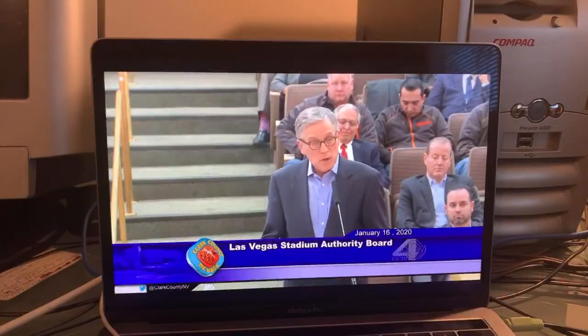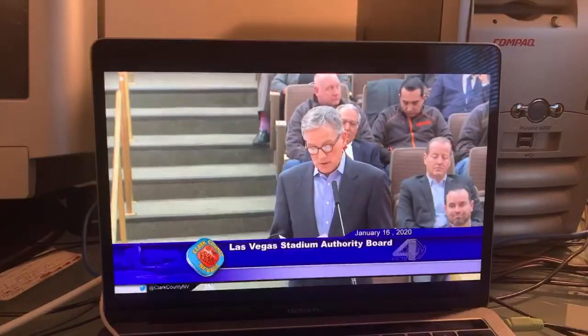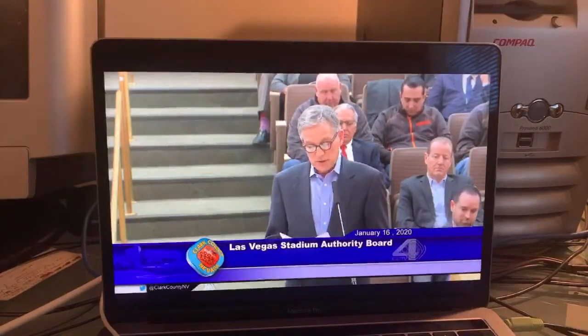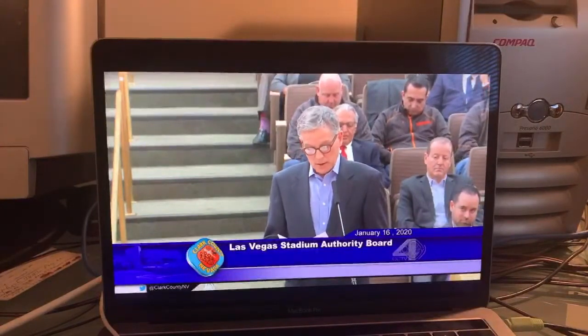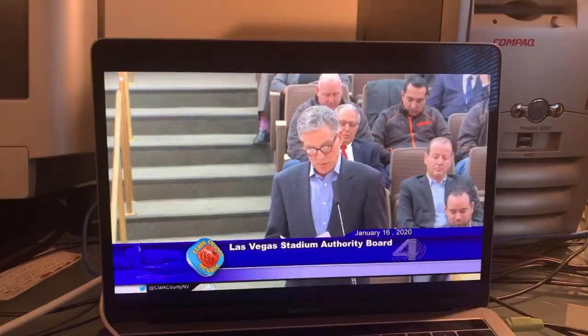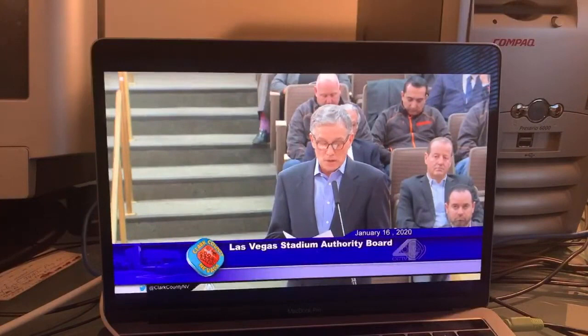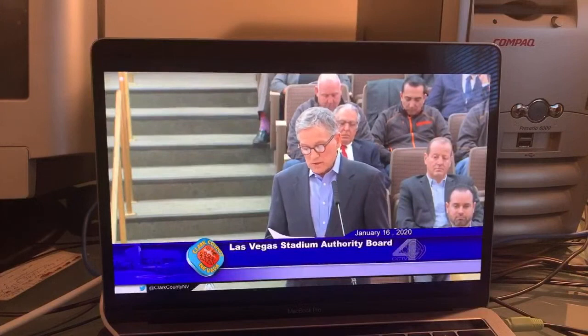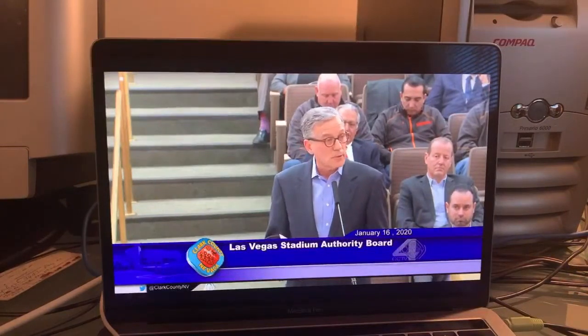I'll tell you why. The idea that rain will cause substantial schedule-jeopardizing damage is belied by the actual experience in December, which, according to the National Weather Service, saw 200% of the normal December rainfall. Yet the total damage sustained, prior to the current protective measures which have been put in place, was less than $100,000 and resulted in no schedule delay. So even the rainiest month of the year, with twice the normal rainfall, was hardly a showstopper.